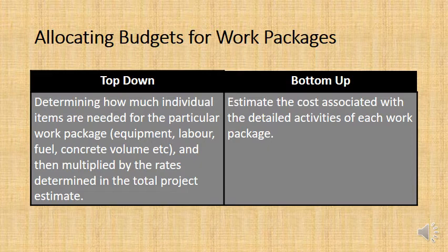And so how do we get around this? Well, basically we need to have good communication when we're doing the budgeting. That's why you have estimating teams, so no one's working in isolation. And also you create a brand new work package called mobilization of crane, and that $10,000 will be set up in that work package.